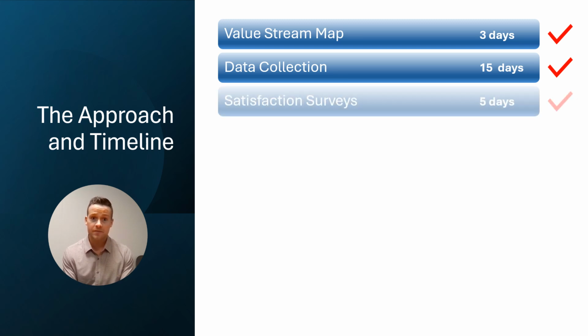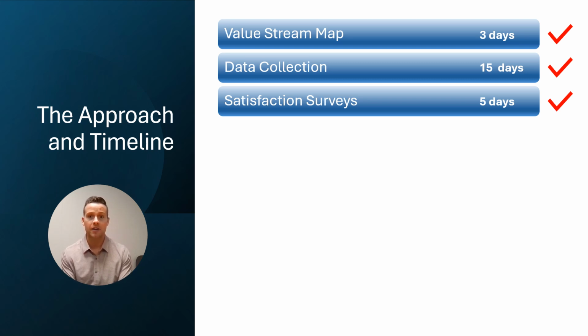The survey took 1 week, with another week to identify and record additional functionalities, or Kaizen bursts. Next, gaps in the current state system will be assessed and future state functionalities and requirements will be identified. We will then draft future state value stream maps and mock-up Tableau views for the burndown dashboard.